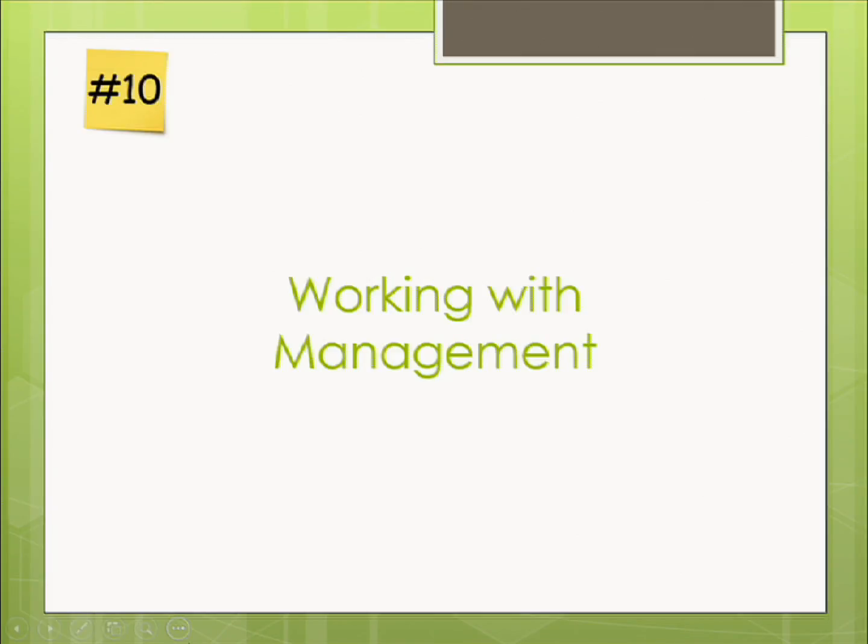So you ask them those questions. Like, they say, how long is this project going to take? Well, maybe I'll say, well, we can do it in 4 iterations. But if you kind of just want the quick and dirty thing where we just sort of copy how we did it in this other past thing we did, then we can do it in 3. So I'm giving them options and explaining the difference between the two. And maybe they sign up for the longer one, but now they know why it's 4 and not 3.